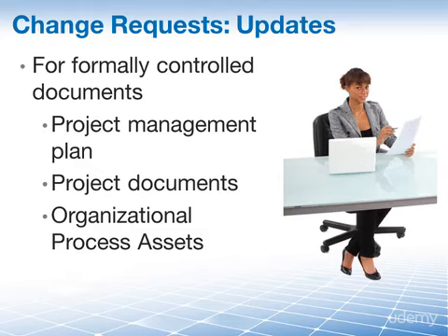We can't just update them willy-nilly. We have to issue a change request that we want to update these documents. That change request is then processed through the integrated change control, and if approved, only then is it implemented.